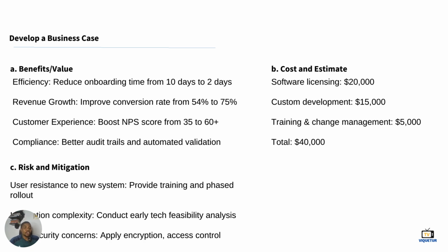Then there could be integration complexity. This is a risk. So what we are going to be doing is we are going to conduct early tech feasibility analysis to be sure that our technical capability can actually implement this solution. Then we'll do vendor analysis as well to be sure whether we have enough human resources to build this, or we just need to buy off the shelf.